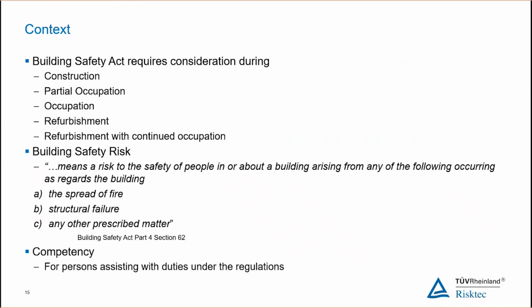The risks that are going to exist are going to be different, and possibly not all of the scenarios or all of the controls will be in place, because the building is not necessarily finished. But there are going to be new hazards introduced by the presence of construction. We may also have partial occupation during the construction process. That gives us one particular set of risks, and we need to make sure that those are managed. Then we can move from that into full occupation, and make sure that the risks we are managing throughout all of that continue to be looked at.